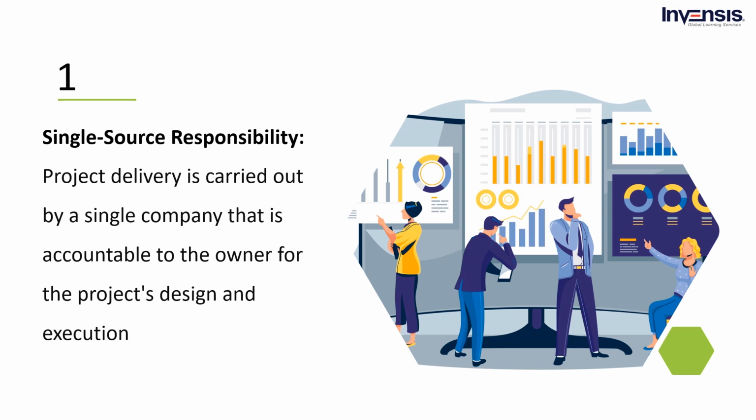Here are several examples. Firstly, we have an integrated firm which performs design and construction but subcontracts specialty services and work. Secondly, we have a construction firm that performs construction work but subcontracts selected construction work to trade contractors and design services to a design firm. Moving on, there is the design firm that performs the design services but subcontracts specialty design services and construction work to a general contractor or trade contractors. Finally, we have the developer firm that performs very little of the actual design and construction forces.